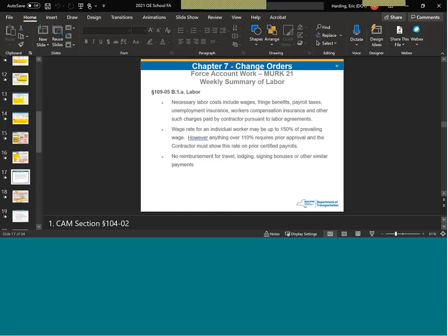Like if they have to have 10 hours, their fringe rate is $20 an hour, you're going to want to put the 10 hours, it's going to be there anyway for the regular wages, but you're going to want to put the regular fringe rate in as well as the cash fringe total. And then the fringes will be carried over to the subtotal on your force account summary sheet, and then the 6.4% will get applied to the $200 you added in the cash fringe field on the MERC 21, 21-1, 21-2, however many sheets you have there. And then the workers' comp insurance reimbursement will also apply to your cash fringes.